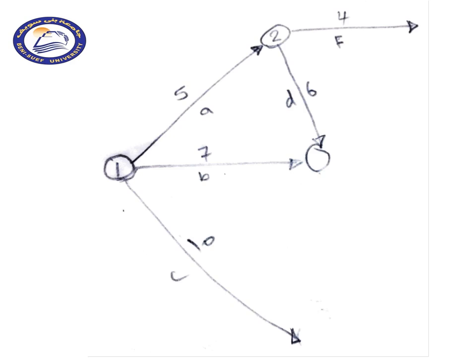But why did we choose to put activity D on the downside and activity F on the upper side of the network? Because when we look at the exercise itself, we will find that activity I will start immediately after both activities B and D are finished. So it is important to combine activities that belong to each other and that are dependent, for other activities to start, together.